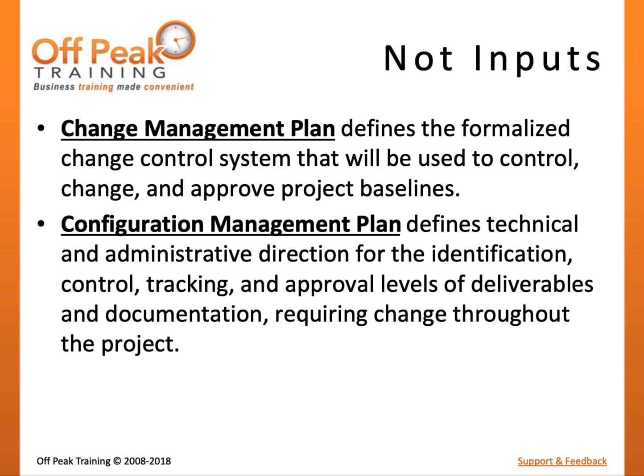Since project baselines have been approved by key project stakeholders, they cannot be changed arbitrarily. This plan will describe the procedures for how the integrated change control process should be performed to manage changes to scope, schedule, and cost. The Configuration Management Plan is similar to the Change Management Plan, but focuses on changes to deliverables, the other management plans, and other project documents.